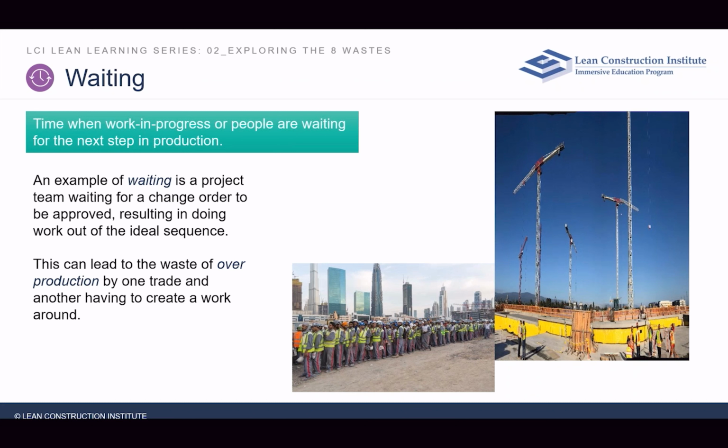In our general rule of thumb, RFIs took 10 days to review. 10 days of waiting. Now, in this day and age, I think 10 days of waiting for anything is unacceptable. Amazon has taught us that we can get products in a day if we want to. So I think waiting 10 days for an RFI response is a poor way to do things.